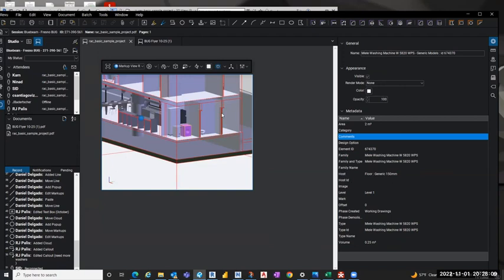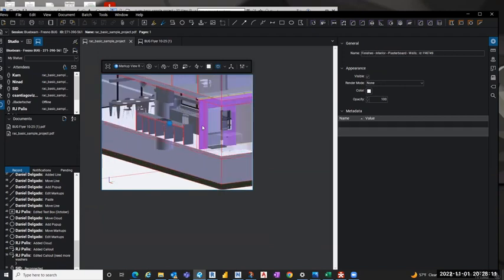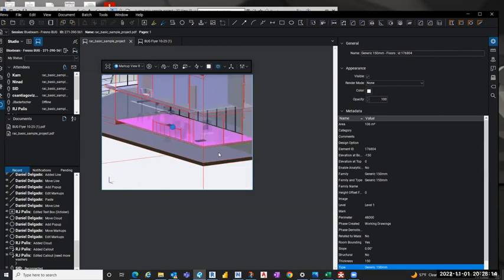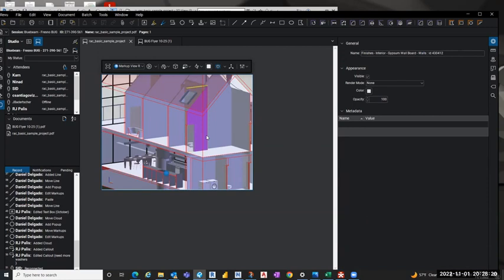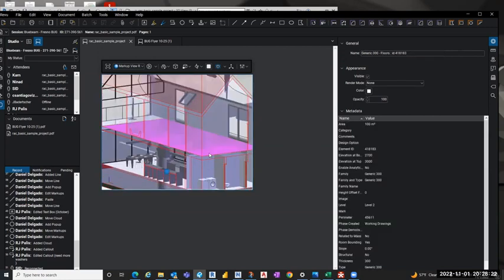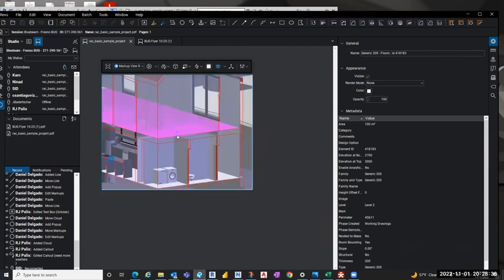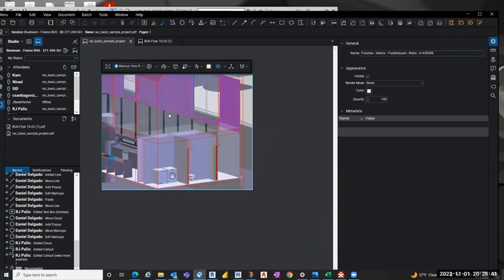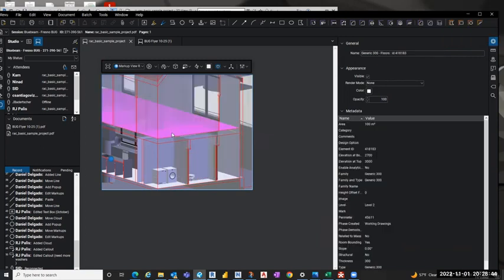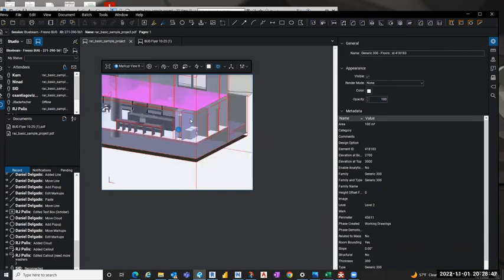So here, all these values come from Revit, all these smart values. And that's why the I in BIM is very important, because this is the information that you can use for your P6 schedules, right? Let's say you're creating an activity for when you pour concrete floors. Now you can tie this model to your P6 schedule, because now you can tag an activity ID for this floor, right? This is the information that is used in 4D, how you can connect the 3D model with your schedule.